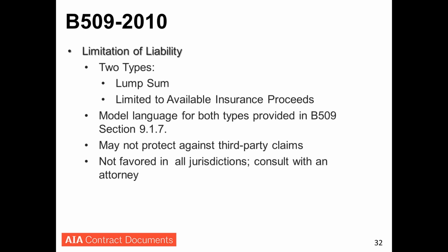And I just want to add on this, you don't have to go back to the slide, Husky, but on the point Kevin was talking about with the early notice of defects, it's really important for you to talk with your insurance advisor and your attorney when you engage in a condo project in a specific jurisdiction, because there are statutes geared towards these as well. One that many states have is called a right to cure statute. That typically requires that the homeowners association provide the architect and/or the contractor with notice and an opportunity to cure defects before they file a lawsuit. So you certainly would want to know if your jurisdiction has that kind of statute, because it is helpful and it helps to govern the process if there are any defects found post-construction.